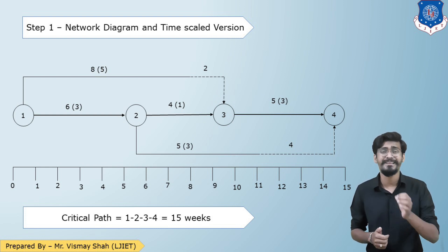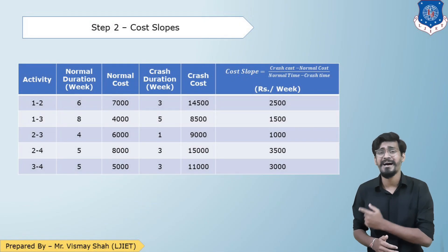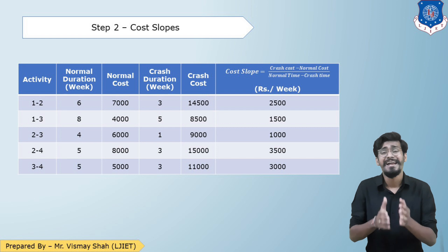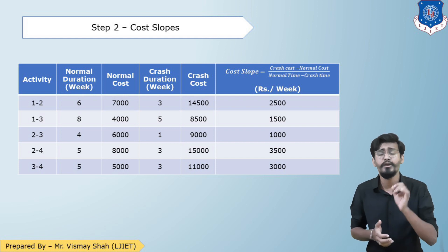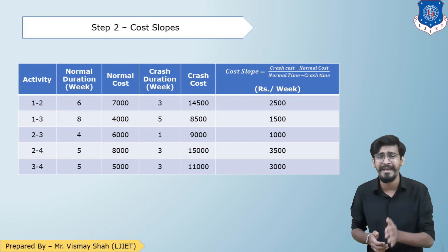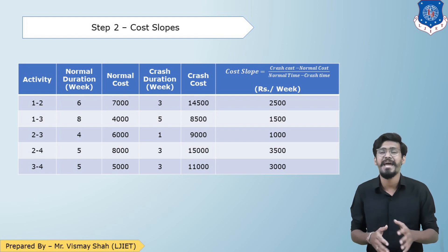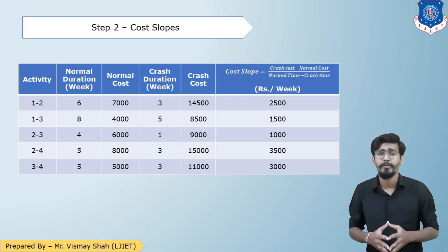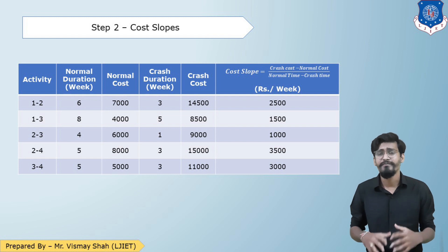Now let us move forward with the second step: the cost slope table. Here I have reproduced the table from the question and added a column for cost slope. Using the formula — crash cost minus normal cost divided by normal time minus crash time — I have calculated the cost slope for each activity. We will finish this numerical in the next session.